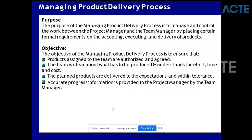Now, Managing Product Delivery. This happens after initiation. Managing Product Delivery will be below Controlling a Stage. The purpose of the Managing Product Delivery process is to manage and control the work between the project manager and the team manager by placing certain formal requirements on accepting, executing, and delivering a product. The objectives are to ensure that products assigned to the team are authorized and agreed, the team is clear about what has to be produced and understands the effort, time, and cost, the planned products are delivered within tolerance, and accurate progress information is provided to the project manager by the team manager.